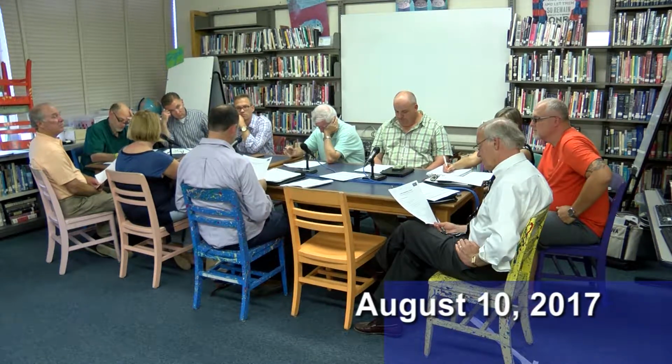Exterior framing and sheathing, so a month ago, none of that yellow sheathing that you see around the building was installed. None of that, or they had just started putting up some of the exterior framing. So all that's been ongoing. The interior framing, so a lot of those classroom walls, I would say maybe 90% of the interior framing has been installed. The structural steel was still going on at the gym area, or that half of the building, so that has all now been completed.